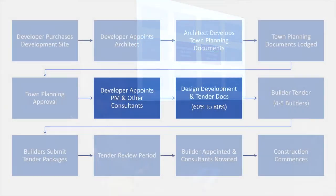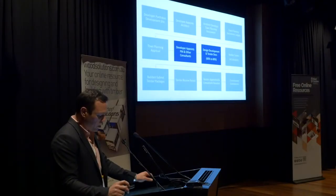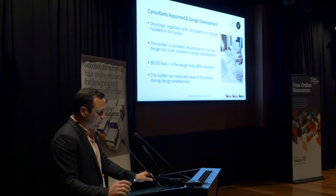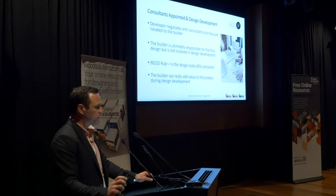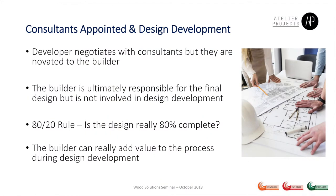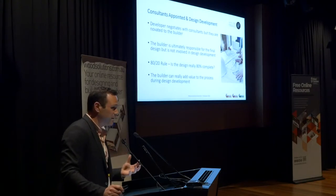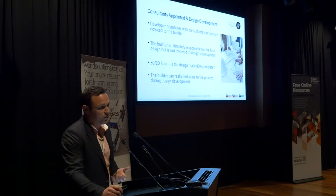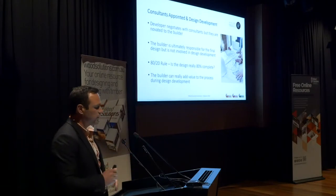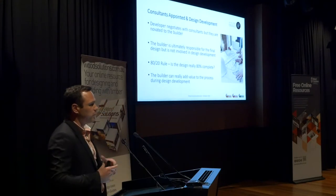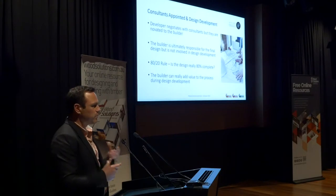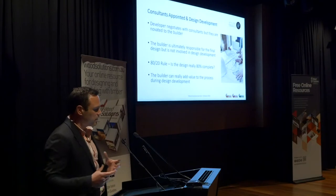Moving into the next section: the appointment of a project manager and consultants over and above the architect, and the development of design and tender documents. It's really important to note who negotiates the deal with the consultants and who is actually responsible for the design during construction. The developer appoints consultants, a scope and price is determined, and then they get novated across to the builder after the tender process. There's often a lot of discussion around that novation document — is it really 80% complete? Is there enough money to finish the design? What VM options have been identified? Is redesign required? This contractual complexity extends beyond the head contractor to the arrangement with the consultants, and it becomes really messy because the design does shift during this process.